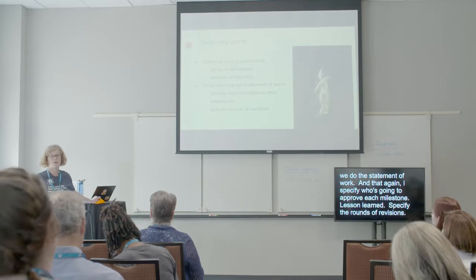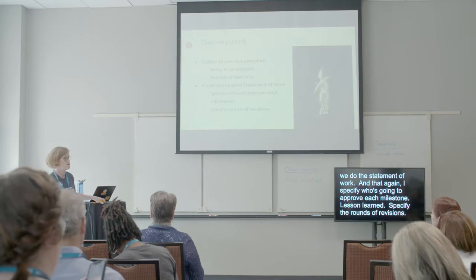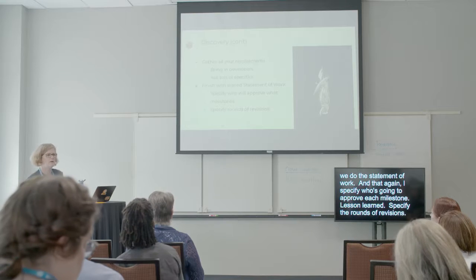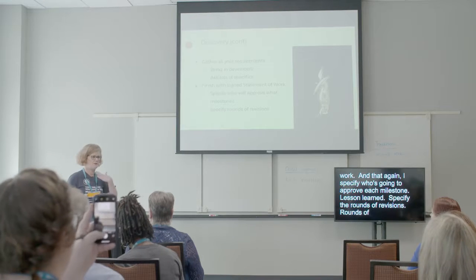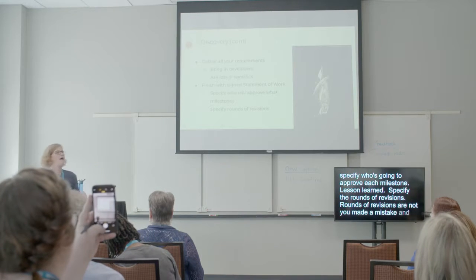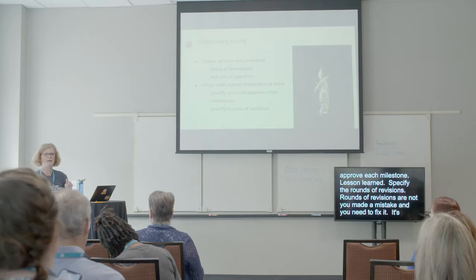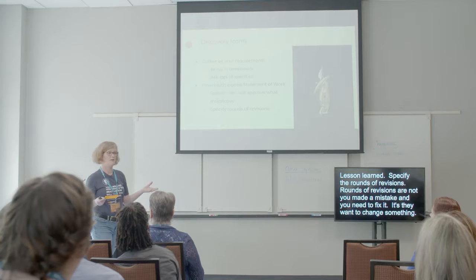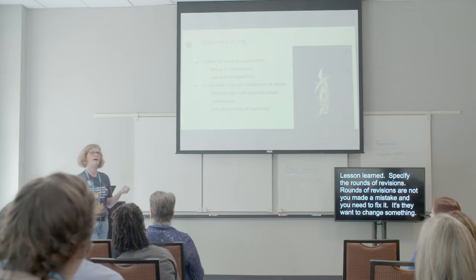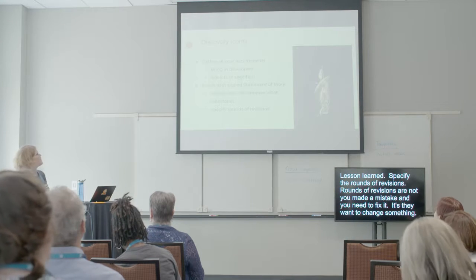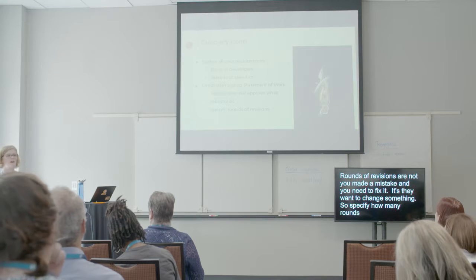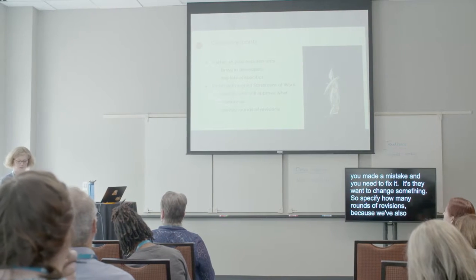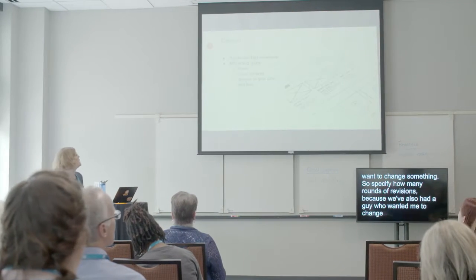I did have a client make a very good point to me once about rounds of revisions. Rounds of revisions are not, you made a mistake and you need to fix it. It's, they want to change something. And we had made mistakes. I'm like, oh, that was a round of revisions. He's like, no, it wasn't. You didn't follow the design. Yeah, you're right. So specify how many rounds of revisions. Because we've also had a guy who wanted me to change the picture about 25 times.